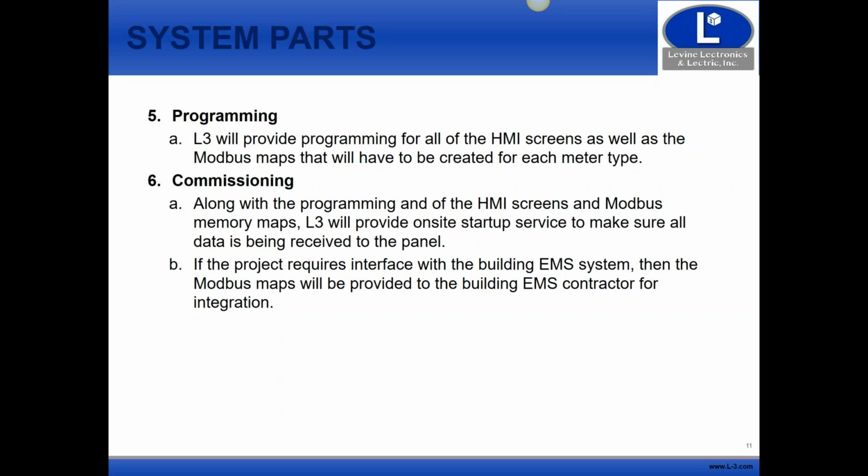But we do programming that's typically done before we get on site. While the contractor's installing the panel at the site, all this can be done. And then we always provide on-site commissioning for each one of the projects. It's always included. The idea is you've got to make it work.